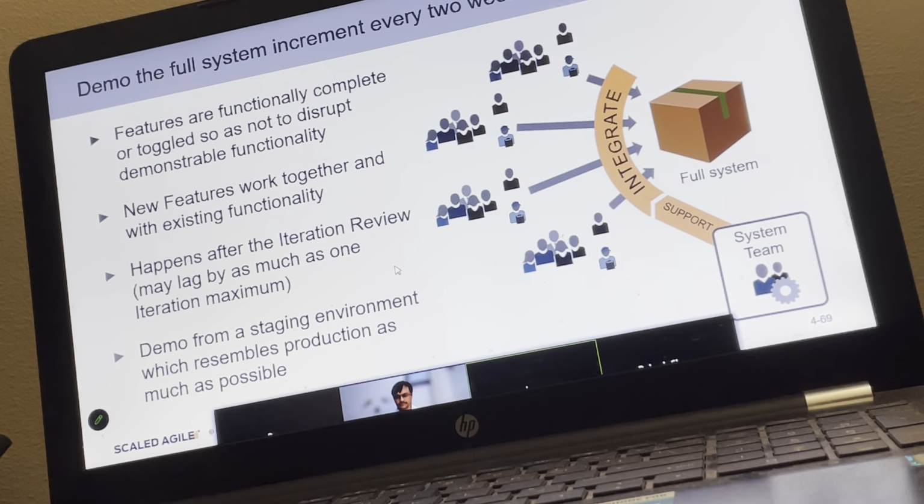It's not predefined how we have to do it, it's up to the environment you are in. In some cases, if you have 50% rework, then you better plan your capacity for 50% rework. In some cases, you may be supporting the current production also. You might be getting some production defects, so you need to plan some capacity for that also. Plan 20% capacity for that.